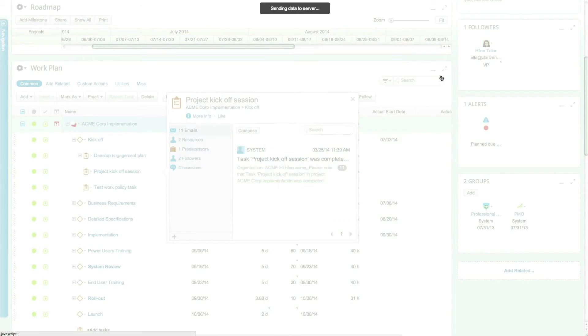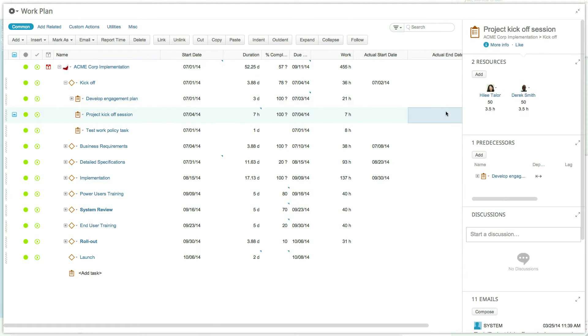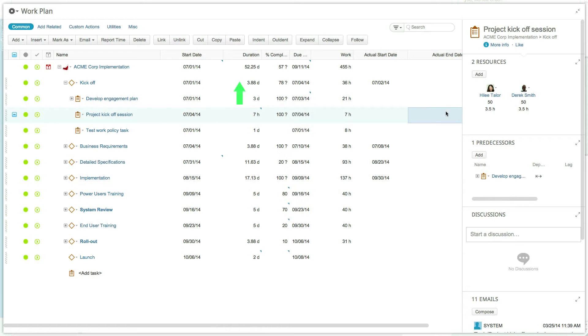Now let's take a look at a project. The duration, or length of time a work item will take, is set at the task level. This duration is then rolled up into the milestone and project automatically.